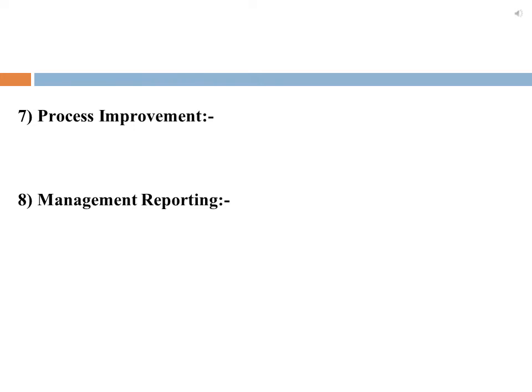Then next is the management reporting. It is important that the defect information, which is a natural byproduct of the defect management process, be analyzed and communicated to both the project management and senior management. This could take the form of defect rates, trends, types of defects, failure cost, etc.